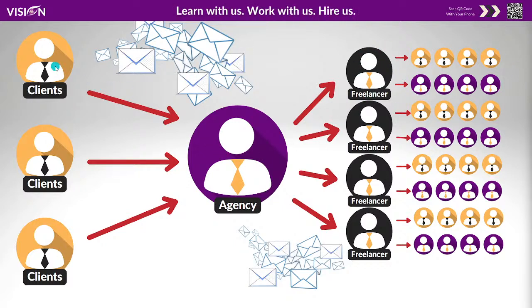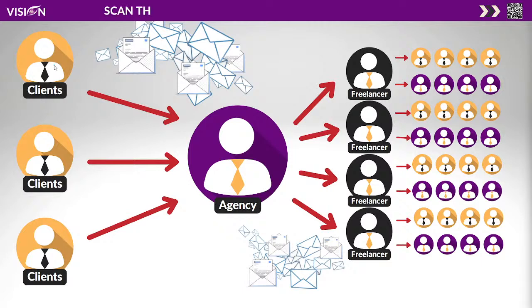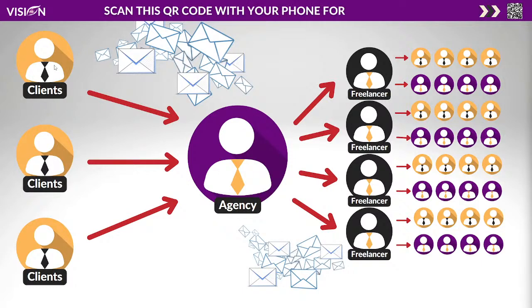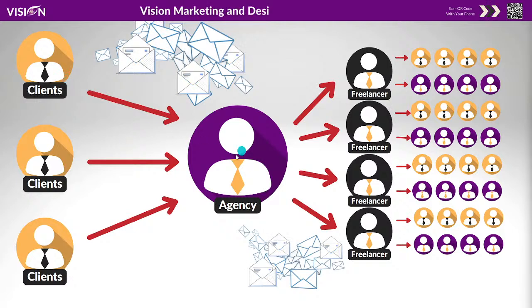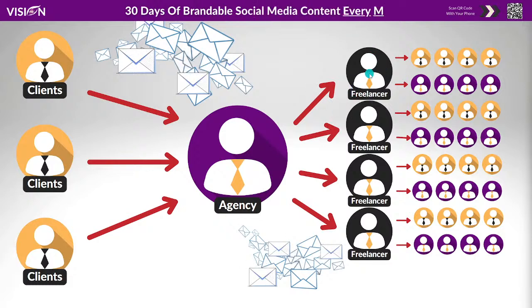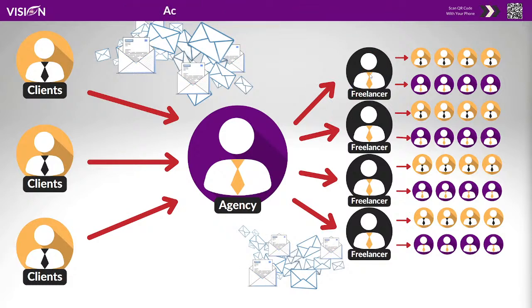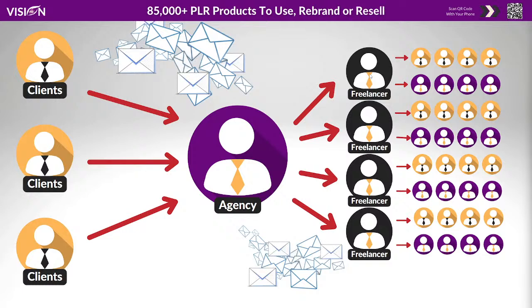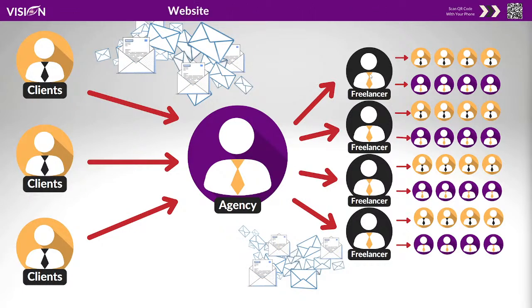And the next day, Billy Bob says, oh, no. We changed our brand colors from blue to orange. And then they send you that email. Well, what happens now is you have to send your freelancer an additional email and say, hey, now they need to change all of the blues to orange. Well, if that freelancer's already built out all 7 pages and now they need to go back and change all of the colors from blue to orange, now the freelancer is spending a lot more time.